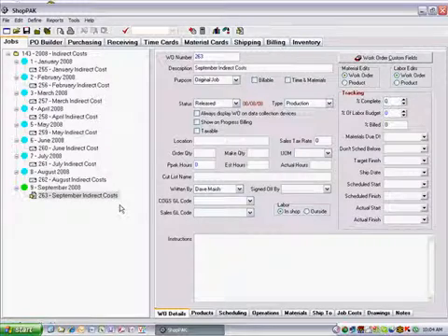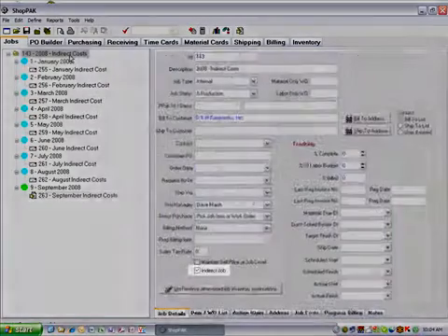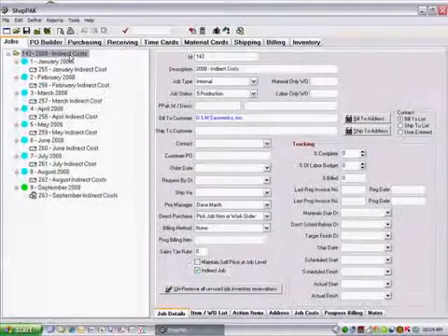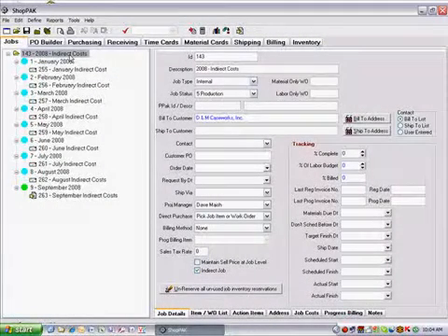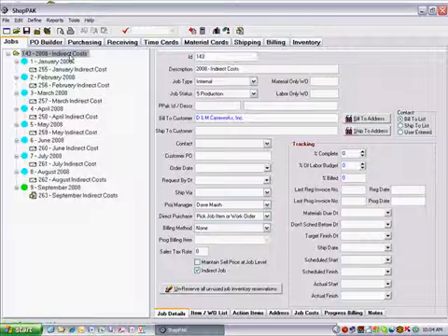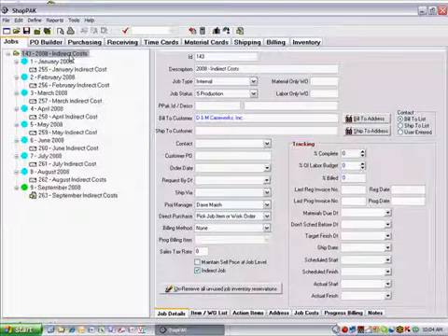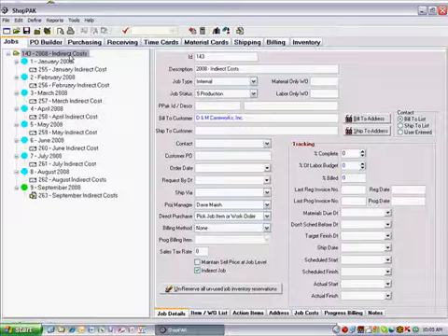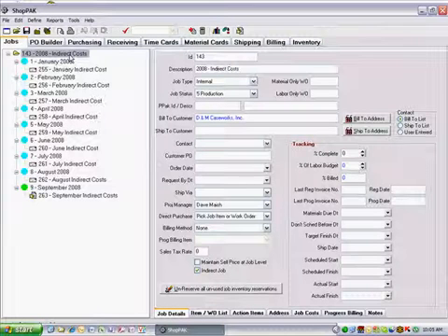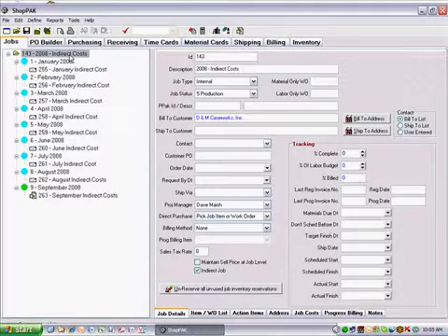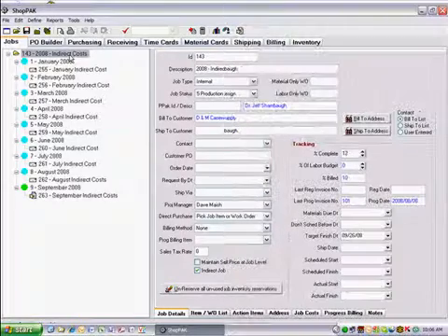When creating an indirect job, make sure you place a check in the Indirect checkbox located on the Job Details sub-tab. Because ShopPAK includes Direct Job, Indirect Job as a filter when generating job-oriented job cost reports, it allows you to separate these two categories of cost. Typically, you don't want to mix direct jobs and indirect jobs when assessing trends over several jobs.